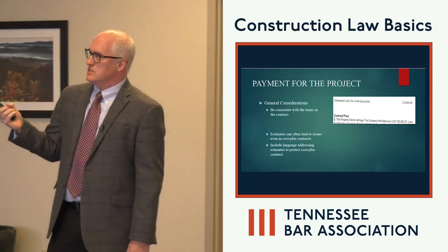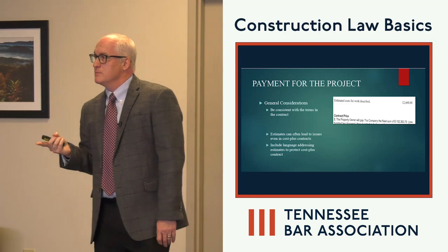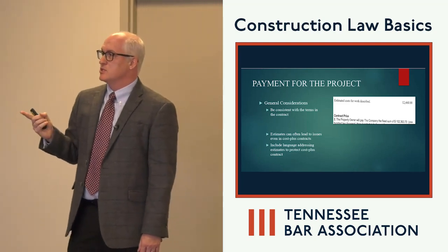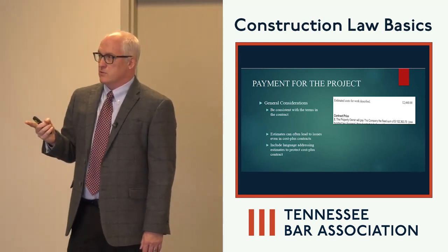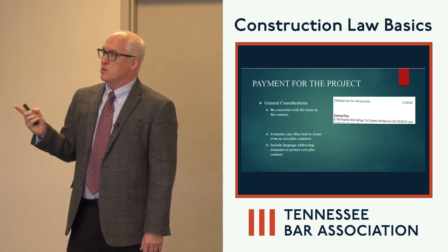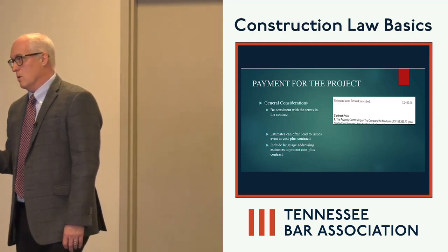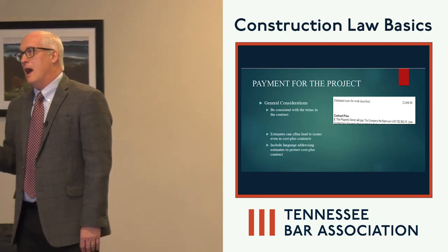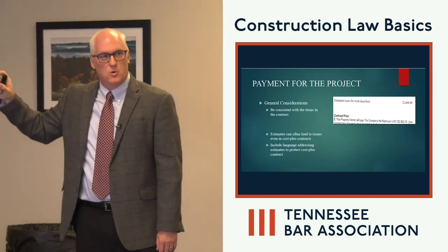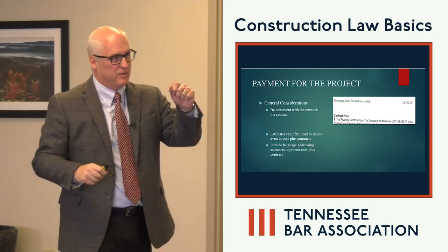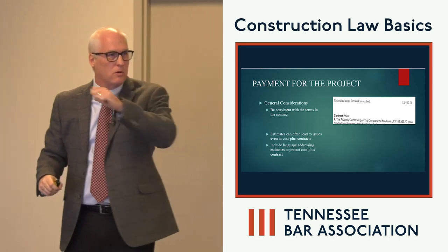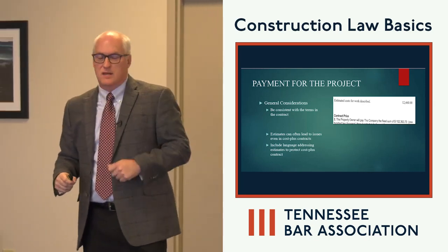The scope of work shall consist of the categories of work described on the estimate attached hereto. The estimate is attached solely for the purpose of describing the category of the work. The pricing on the estimate shall have no bearing on the cost of the work. I'm at the point now where I'm putting that in bold, like a liquidated damages provision. I'm putting a little underline there and making the owner sign it, at least to give my contractor